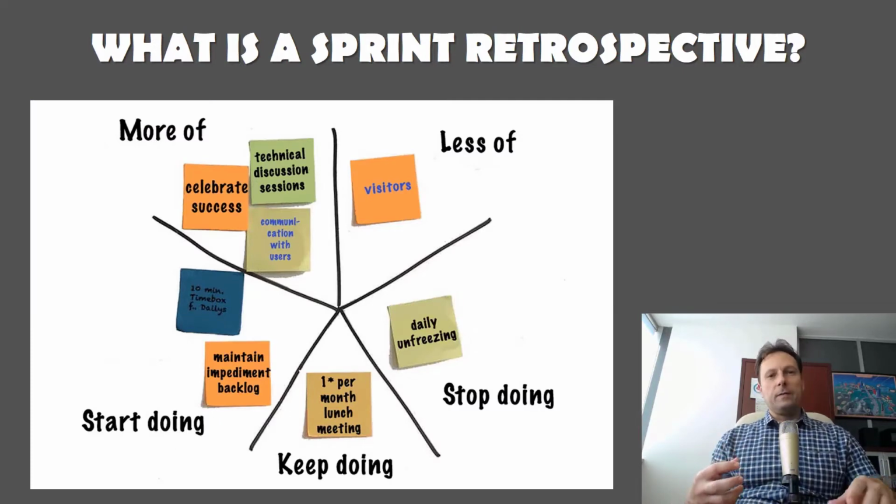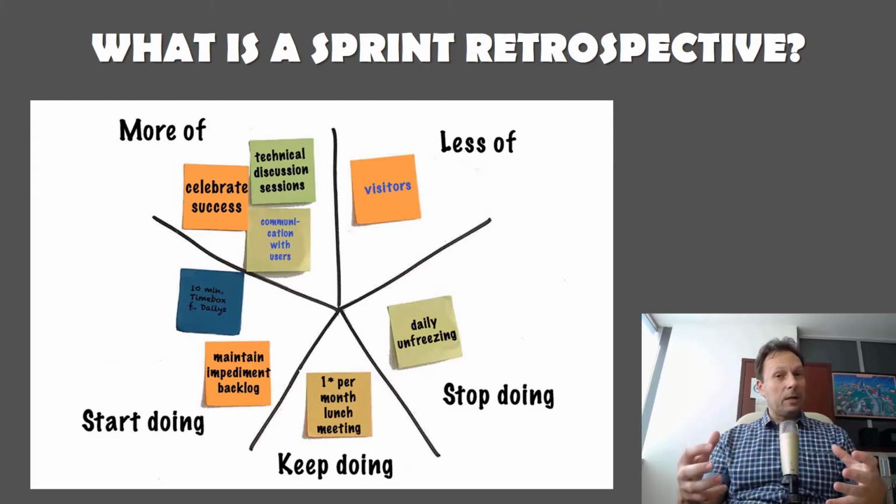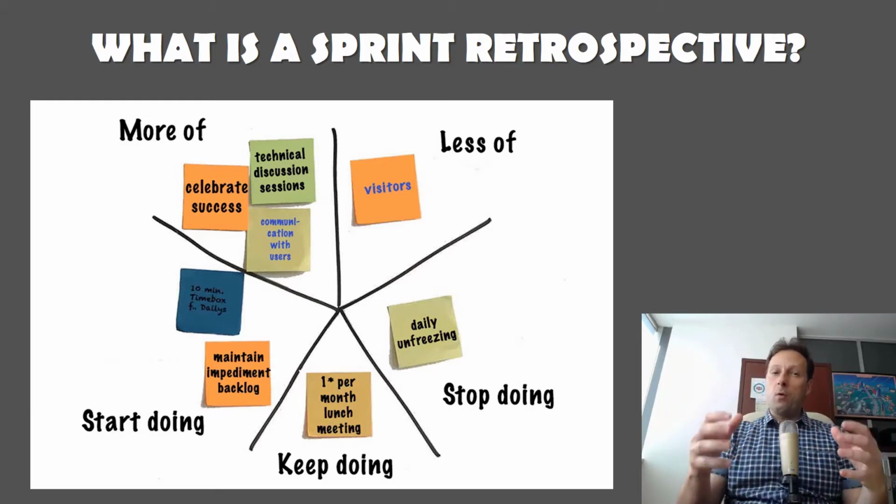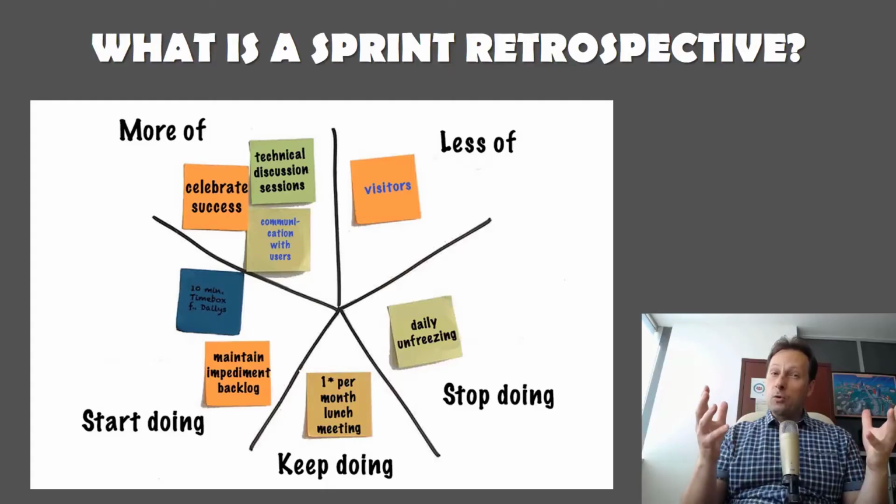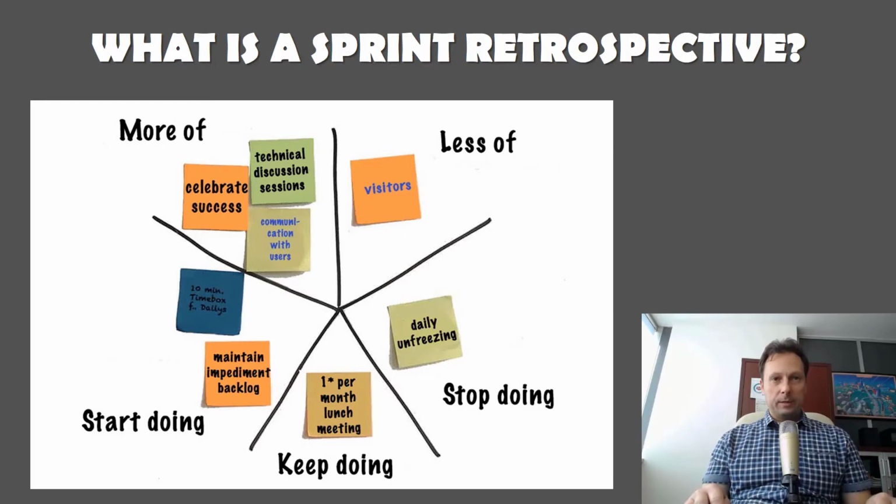In the Sprint Retrospective, the insights learned from the team self-appraisal are then applied to the next sprint, which allows the product development to regularly improve. The team selects what is important and what should be focused on. This gives the team a sense of contribution to improvement and allows them to own it. It helps the team to be internally motivated to succeed, and they don't need outside forces pushing them to improve. Please remember that the Sprint Retrospective is time-boxed to 3 hours or less for a 1 month sprint.